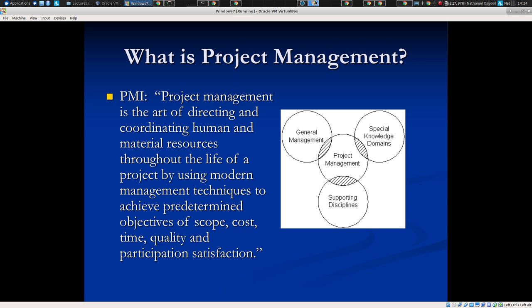Time and value. Well, if you have to do things within a defined time and to a certain degree of value, often by premium options, hiring the very best software developers and teams, you can often muddle your way through it. I say muddle because adding people to a late software project, per Brooks' Law, often makes it later. Cost and value, similarly, if we want to stay within cost and offer a certain amount of value, given enough time, I suspect anyone in the room could probably deliver an appropriate project, given enough time.